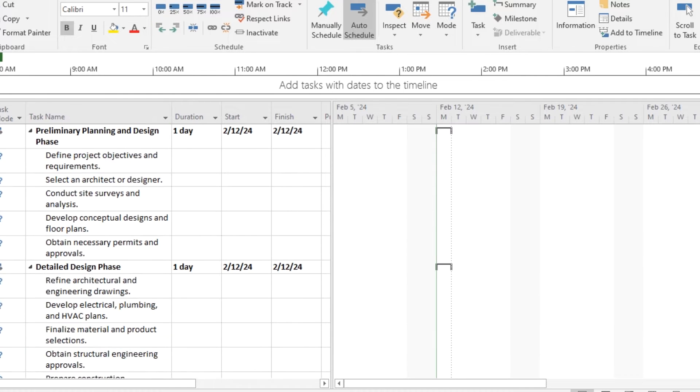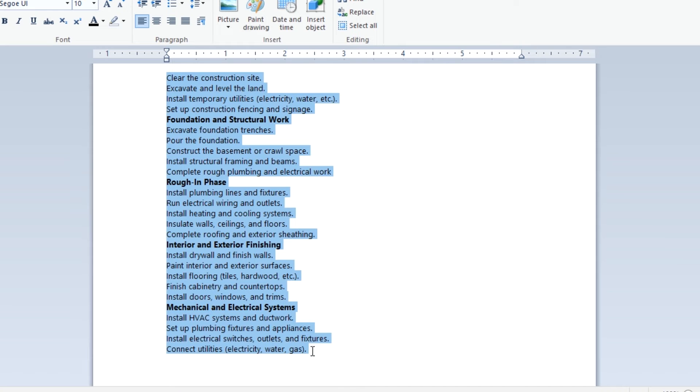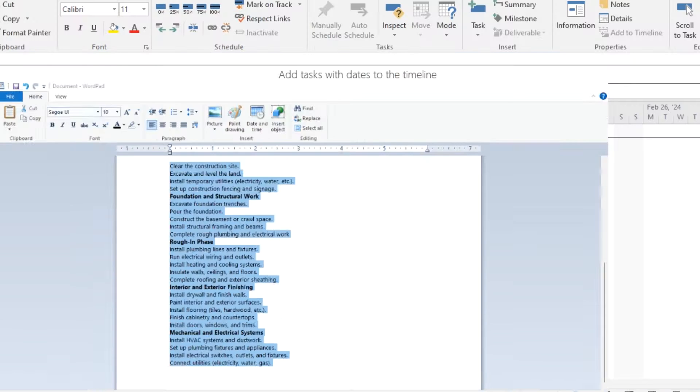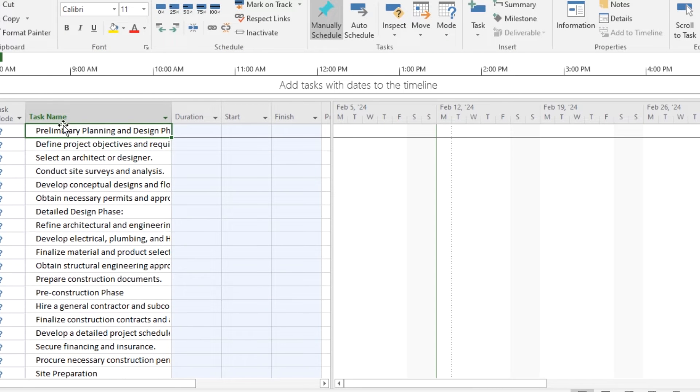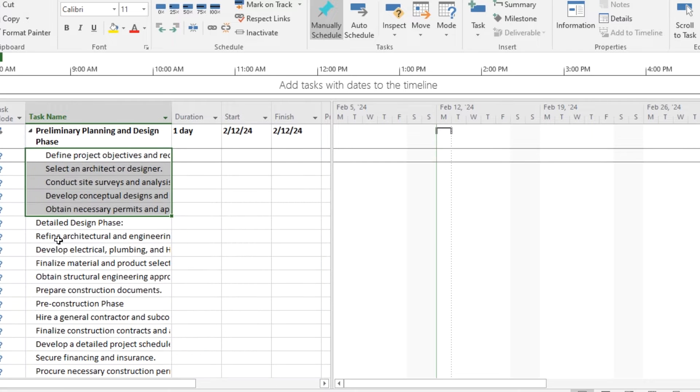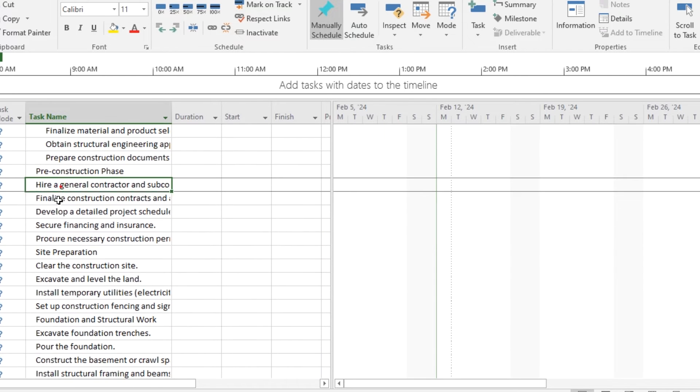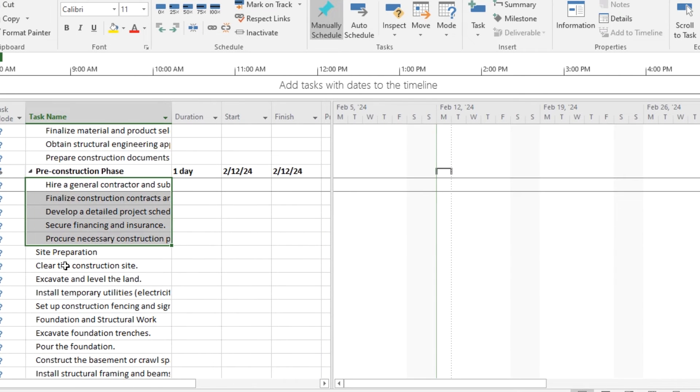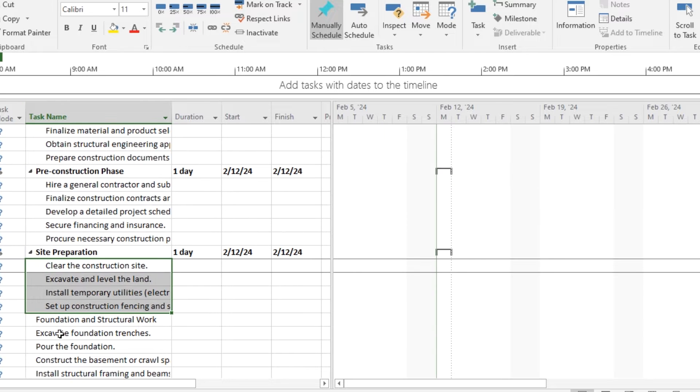Or the other way is to just copy and paste the tasks from the sheet where you have saved, like from Excel or a Word sheet, wherever you have saved. And later on, with the use of indent, you can list them in each phase.